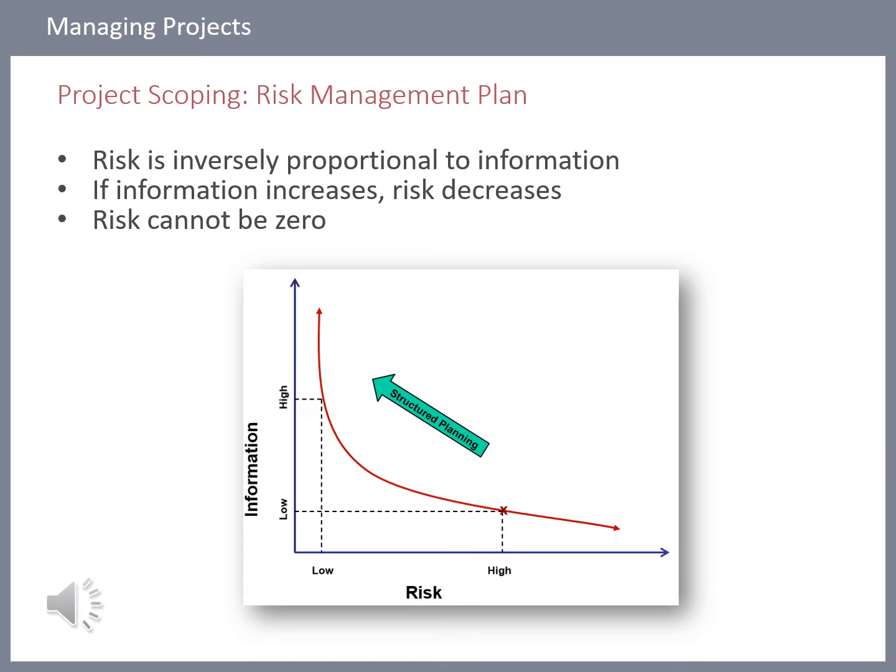You are a civil engineering contractor and you are about to put a new pipeline over, let's just say, a vacant piece of land, or maybe a park in town. You know nothing about what's going on in the ground, so the risk will be high because you don't have information. You might start digging, and you might hit a water pipe or electricity pipe, or there might be even some ancient graves or something in there which will jeopardize the project that you are busy with. So less information, high risk.